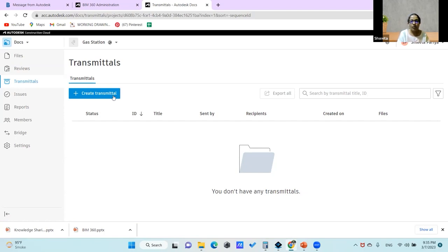So you just can't put out your work in progress models and randomly submit it, or say it's on BIM 360, so that means it's final. No. If you know that it's your final model, you have completed and developed the entire model, put it out for review, put it out in transmittal, send it across to everybody so that everybody has an official email, officially on their Autodesk BIM 360, as an information link.